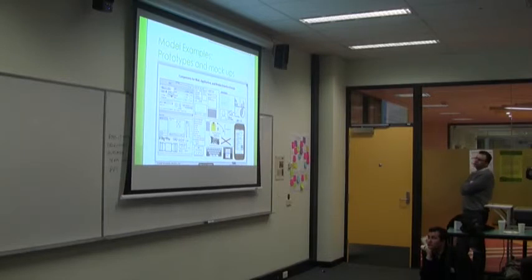I think that we found the risk of a high fidelity prototype is it gets treated as the finished product. Yeah, exactly. We did that with an iPad app, and they're like, right, so we released it in 2 weeks. Like, dude, this is a picture. Have you noticed everything's the same? Oh, so you just got to fix that. Like, no. I know, it kills you. It absolutely stitches you and the team up. Unless you've got a really brilliant trusted relationship with the business, try to avoid it if you can.